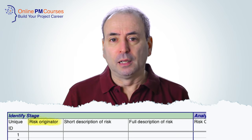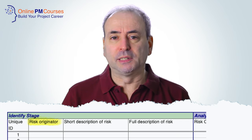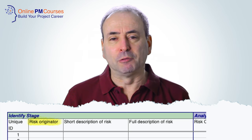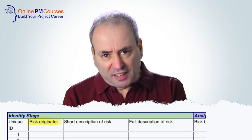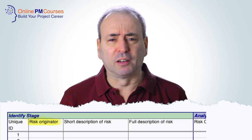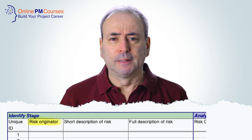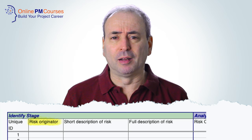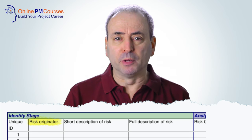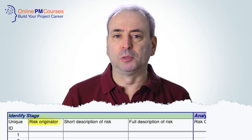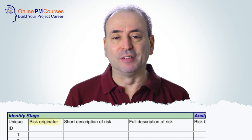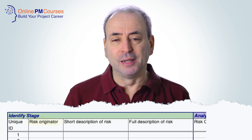Once a risk is identified, it needs to go on the risk register. If for any reason you say 'let's not put that on the risk register', what happens if that risk really does materialize? Someone will remember that you chose not to put it on the register and not to actively manage that risk, and now you become culpable.